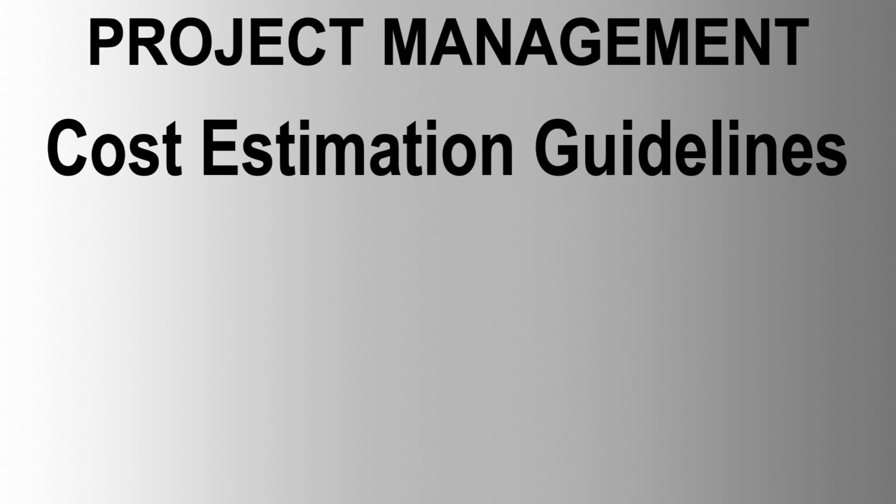Class 2 estimate. AACE Standard Reference Z94.2-1989, name: definitive estimate, typically -5% to +15%. Alternate estimate names, terms, expressions, synonyms: detailed control, forced detail, execution phase, master control, engineering, bid, tender, change order estimate.